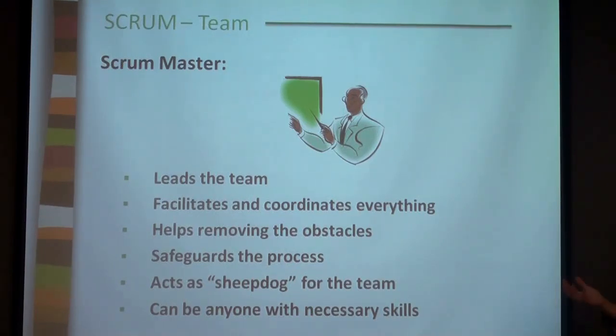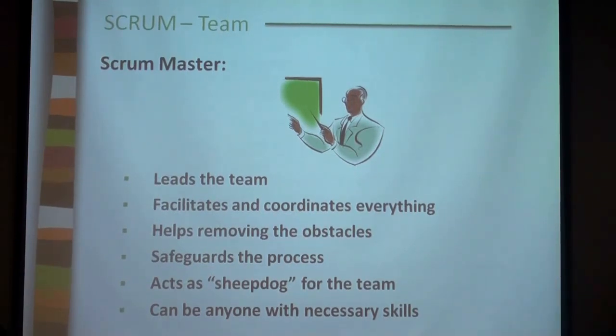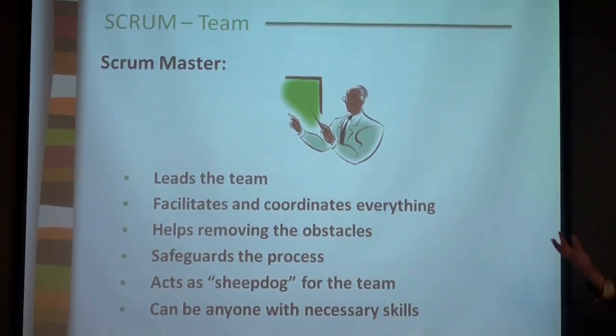And for example, let's say developers develop the code, and testers are supposed to test, and you only have 4 weeks to do everything. And turns out your purchase order got stuck somewhere, and we need to start the testing like today, and we don't have the server with AMD processor in place. Guess who is the guy who will need to figure out where to get the server? The Scrum Master, right? The Scrum Master is supposed to chase everyone down and understand where the machine can be found. And I've seen very creative Scrum Masters in my life.